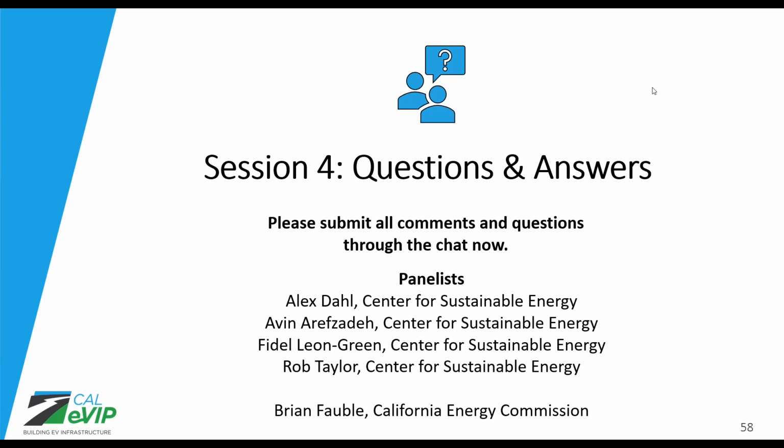Okay, and question for Fidel. Does it appear from today's participants that the available Eastern funds of $20 million will be exhausted very quickly? So I think this is a good question to remind everyone that this is not first come, first serve. So funds can't really be exhausted quickly, because we will intake applications throughout the application window, and funding will not be reserved until the very end of the application window. So all funding will be reserved, I'm blanking on how many days, but it will be reserved after the application window. So I encourage you to apply and not be discouraged by the volume of applications.